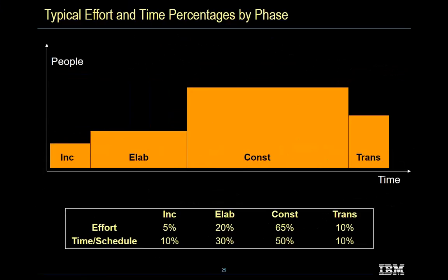In the SAP world also, this is very true. If you talk about a 1-year, 12-month project, you will find that 60-70% of the time goes into construction, 20 to 30% goes into business blueprinting, 5% before, 5% transition. That makes the total 100% of the time in terms of different phases of implementation, whether it's any software or SAP for that matter.